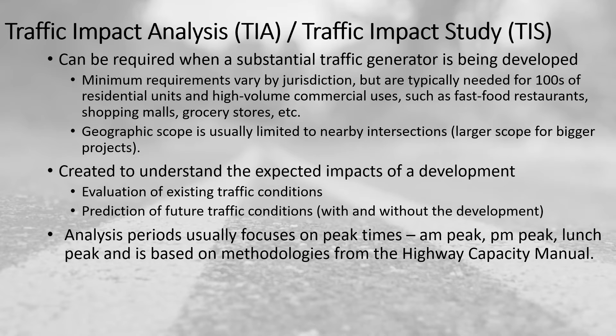The analysis periods usually focus on peak time periods — typically a morning peak hour and an afternoon peak hour, and sometimes a midday or lunch peak period. It's based on methodologies from the Highway Capacity Manual to understand the operational impacts of the development within the TIA.